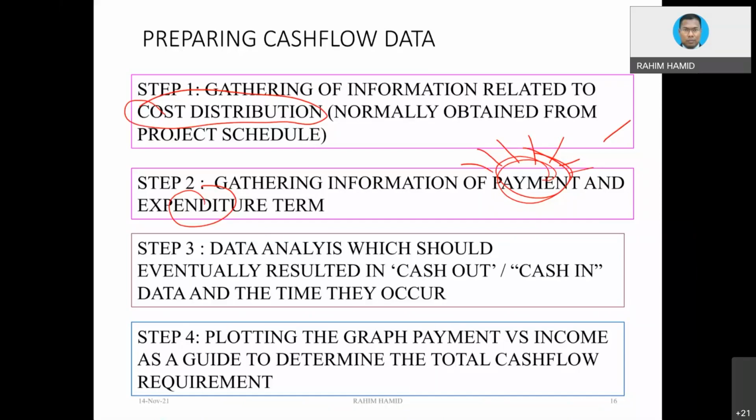Payment we have to look at when the first payment is going to be paid. So most probably you are not going to get payment on the first month of the project. Perhaps not on the second month. The clear case might be you will start with the third month. But whatever it is, in our example, exam question, whatever, we will give the information. Then based on the information, you are the one that basically put the first payment would be occurring on either second month or the third month based on the question given.